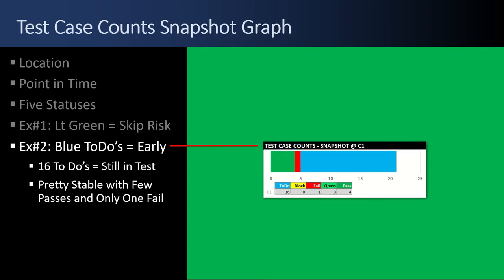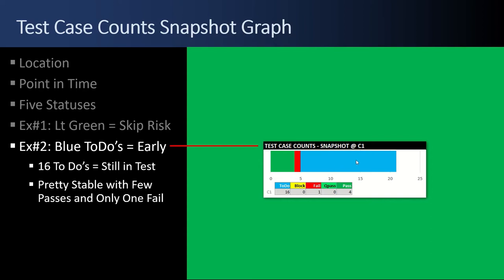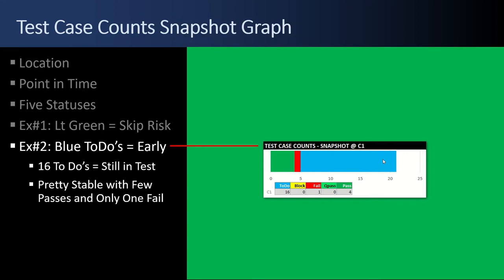Example number two, a whole bunch of blue to-dos. To me, that tells me, oh, this is an early test cycle number one. The snapshot says there's four test cases passed, one failed, and 16 test cases that haven't been run yet. If this were getting close to the end, maybe those would all get flipped to blocked. When I see blue to-dos, I know that it's still actively being tested.